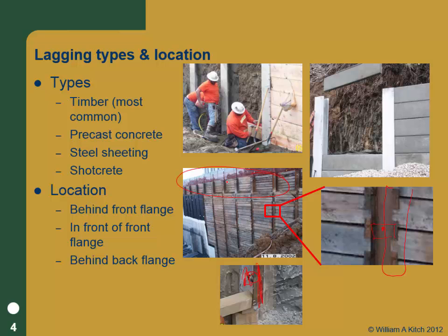But the primary methods for the main part of the excavation are either behind or in front of the flange. And the details of that, this is a construction detail, and it's generally not anything the engineer specifies. But there are some differences when you're dealing with soils that have less stand-up time; sometimes it's easier to put it on the front.